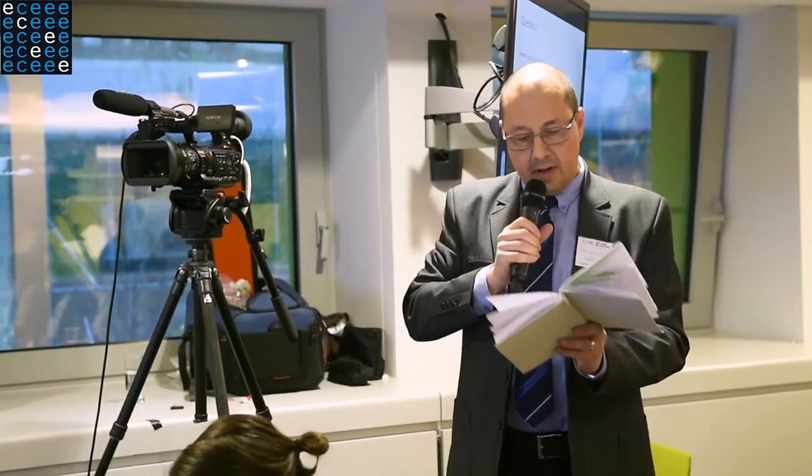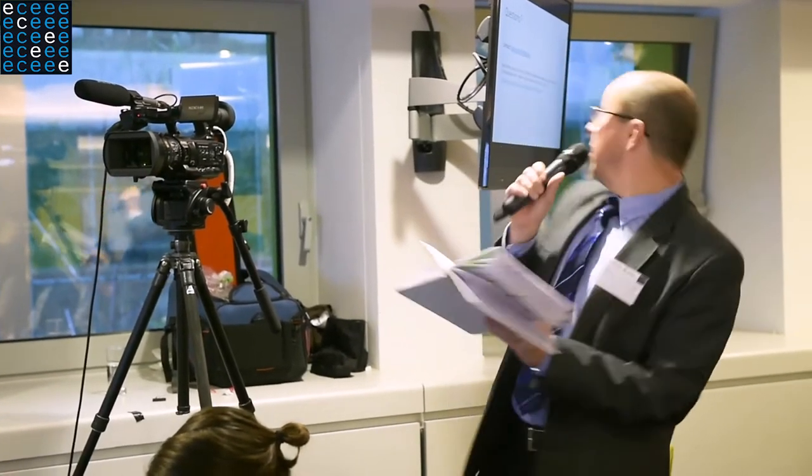Coming back to the presentation, the Ecodesign process indeed. Now the baseline calculation for us is around 48 months. I heard other numbers yesterday, but that's it. And broadly speaking, half of it is the preparatory or revision study, so the technical work, and half of it is the regulatory work, all the steps that we are bound to, which are many.